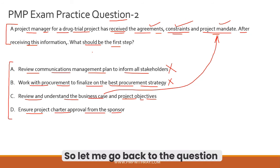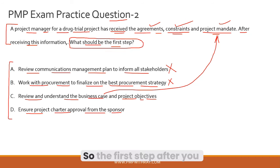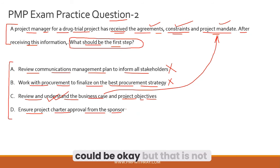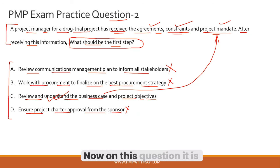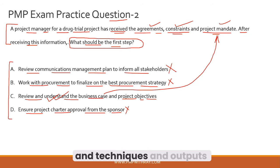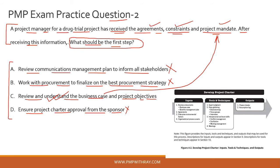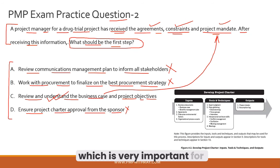Probably not — you've just received the agreements, constraints, and project mandate. It is a far-fetched assumption that a project charter has already been created. The question asks for the first step, so the first step after receiving these items is to review and understand the business case and project objectives. Getting project charter approval from the sponsor could follow, but you need the charter first. It is important to understand how ITTOs — inputs, tools, techniques, and outputs — work in PMP exam processes.